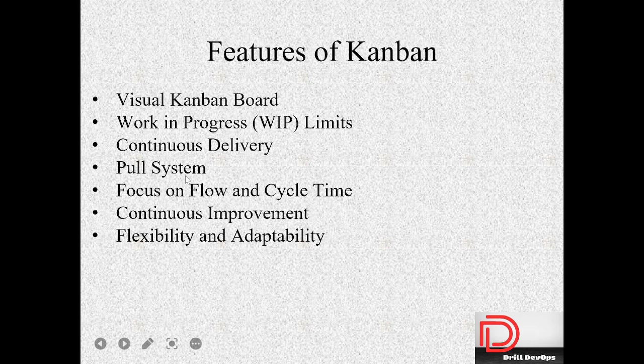Pull system. Here you won't get assigned work by a Scrum Master. The Scrum Master will be there, but he is not going to assign you or wait for sprint planning to be done. It is a pull-based system. Whenever you get a request, if you have some bandwidth, you pick that, which means you pull it from the to-do list, assign it to yourself, work on it and complete it. That is what a pull-based system is.